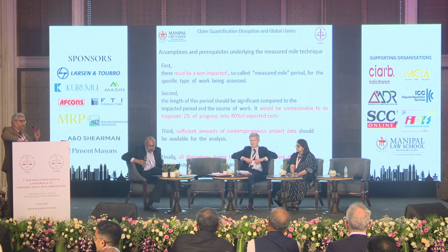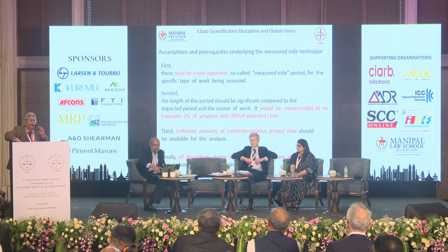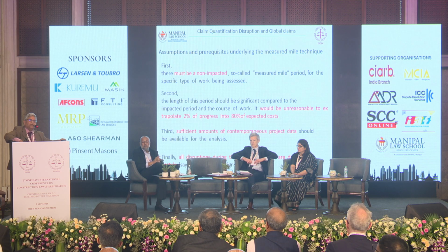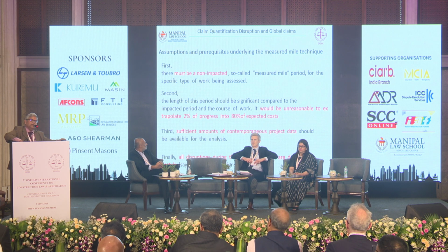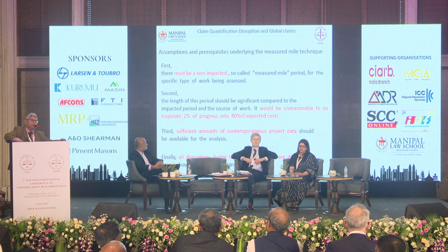Thank you. Yeah. So in the measured mile, there are a couple of points. We cannot take a very small area and extrapolate for a bigger project. It has to be a reasonable period of time you need to consider for the disrupted and non-disrupted period, and you need to have documents. This is where we have a serious problem. I don't think the contractor may have all the delay notices and all the delay analysis, but when it comes to disruption, it is very rare to see a good amount of documents because it's very tedious.